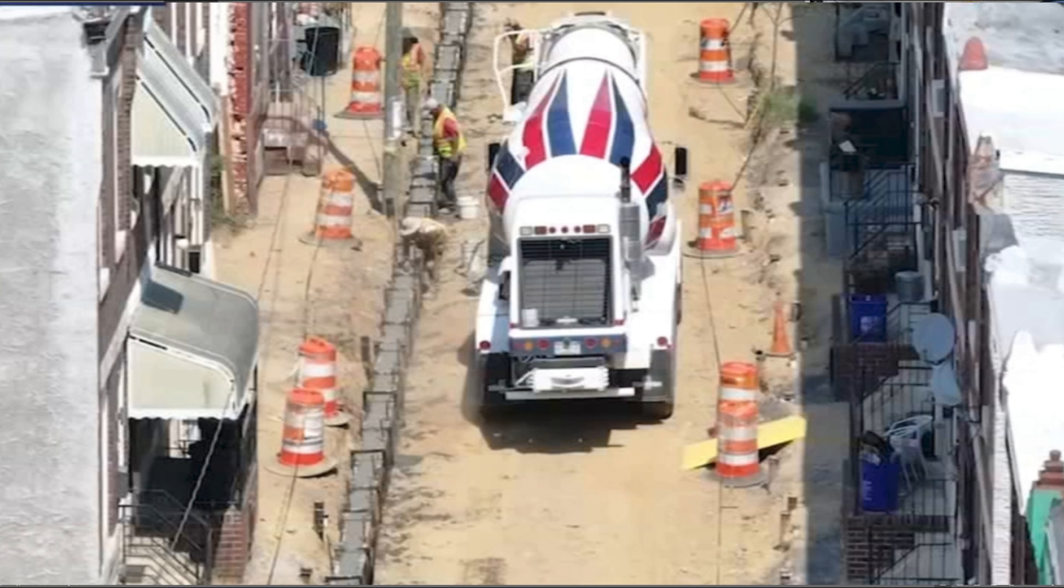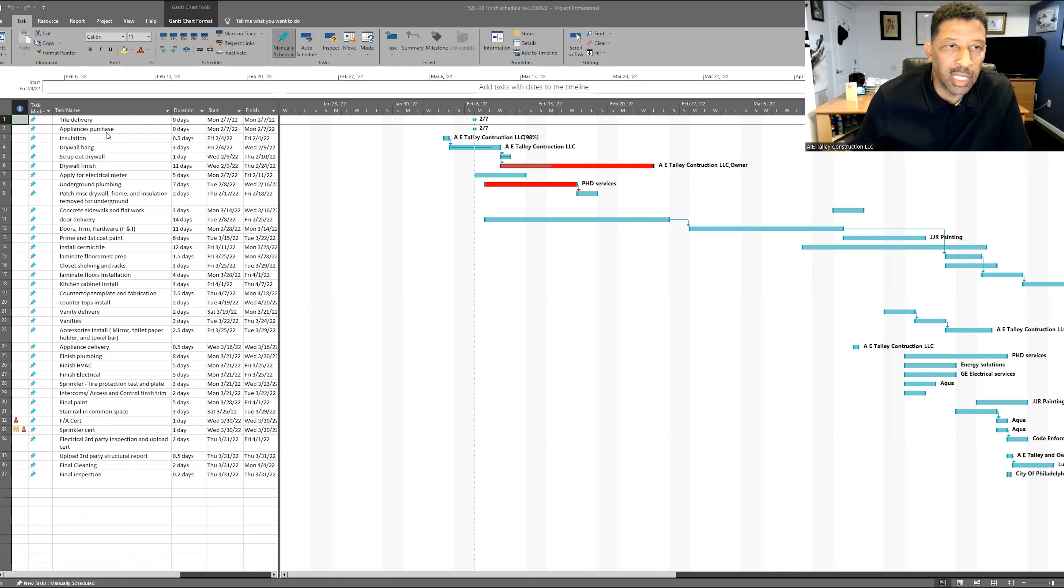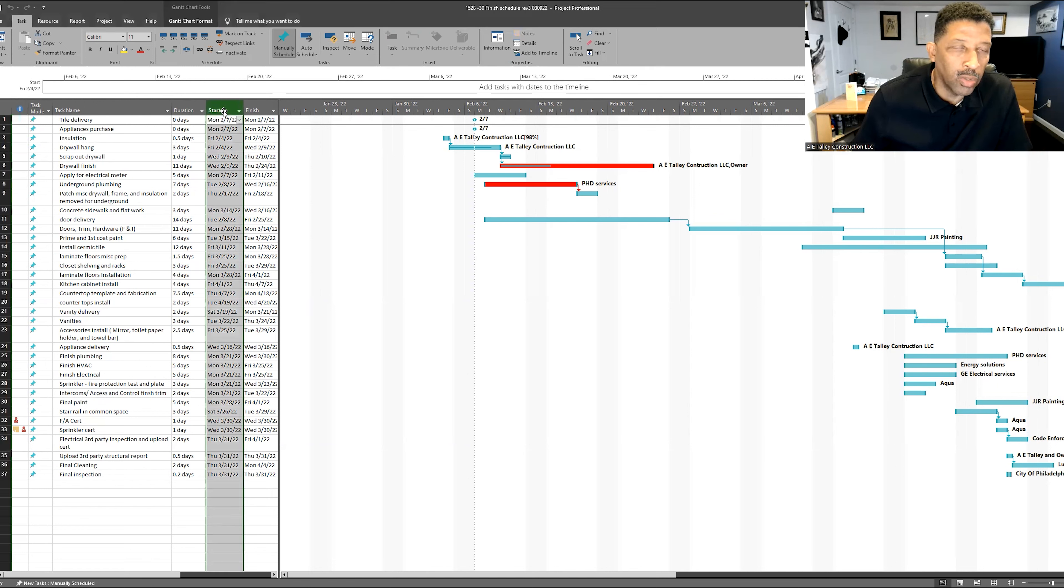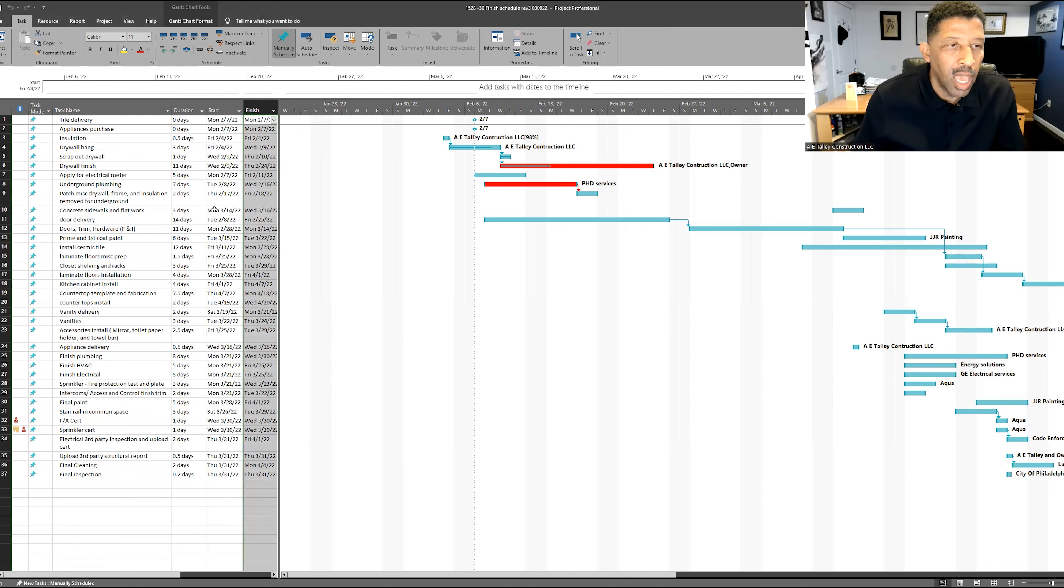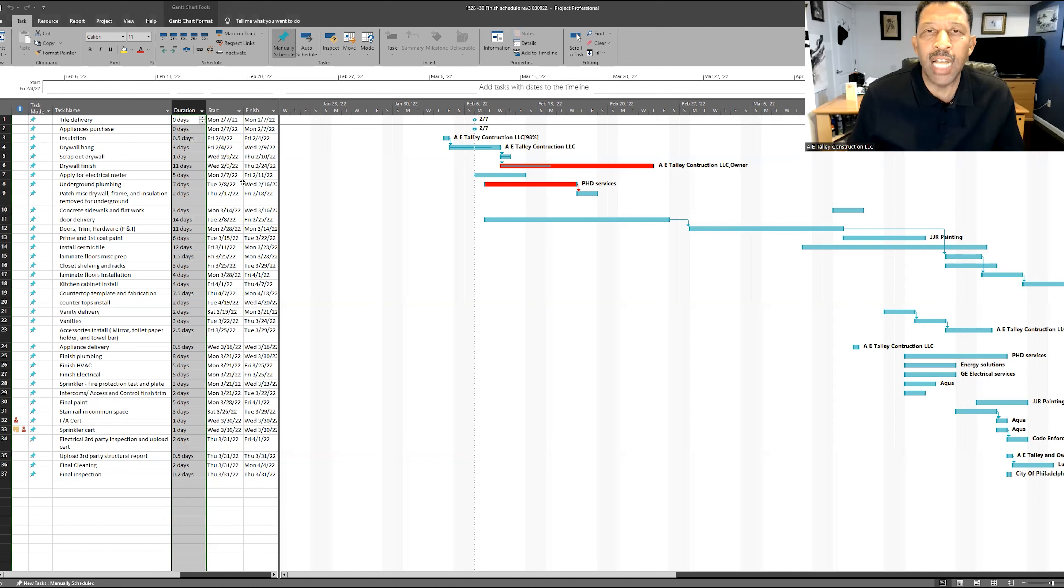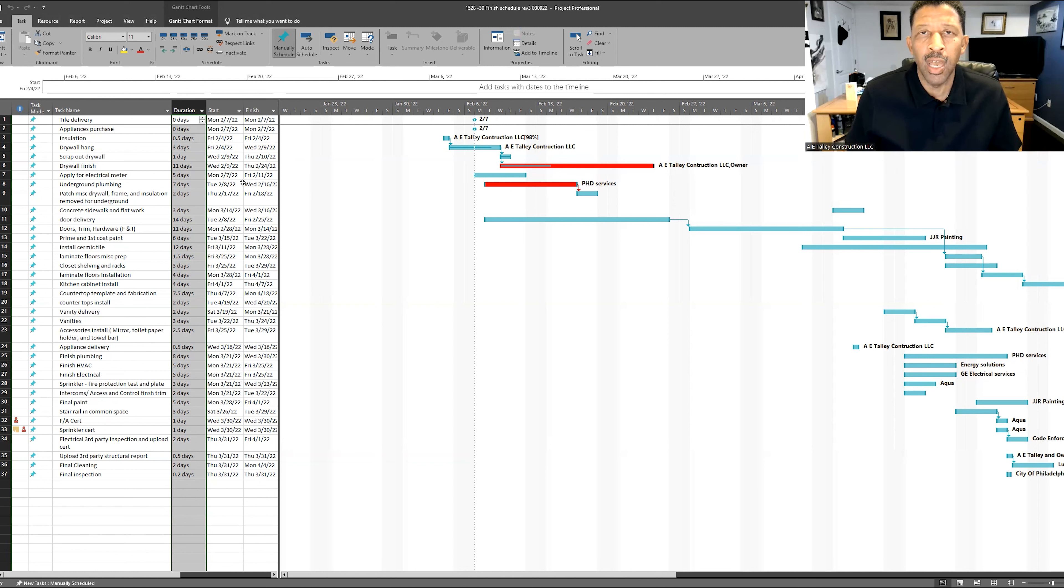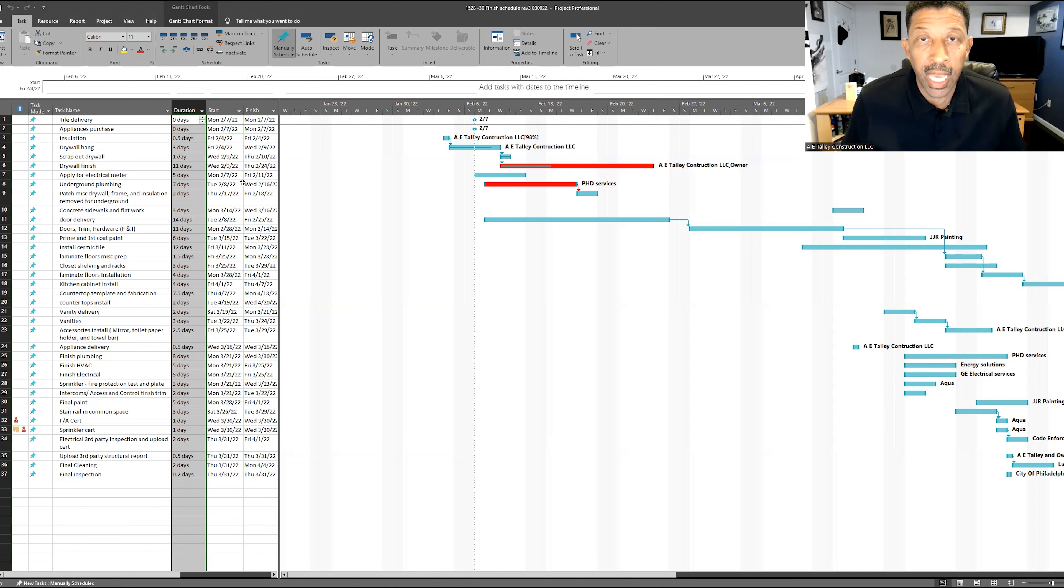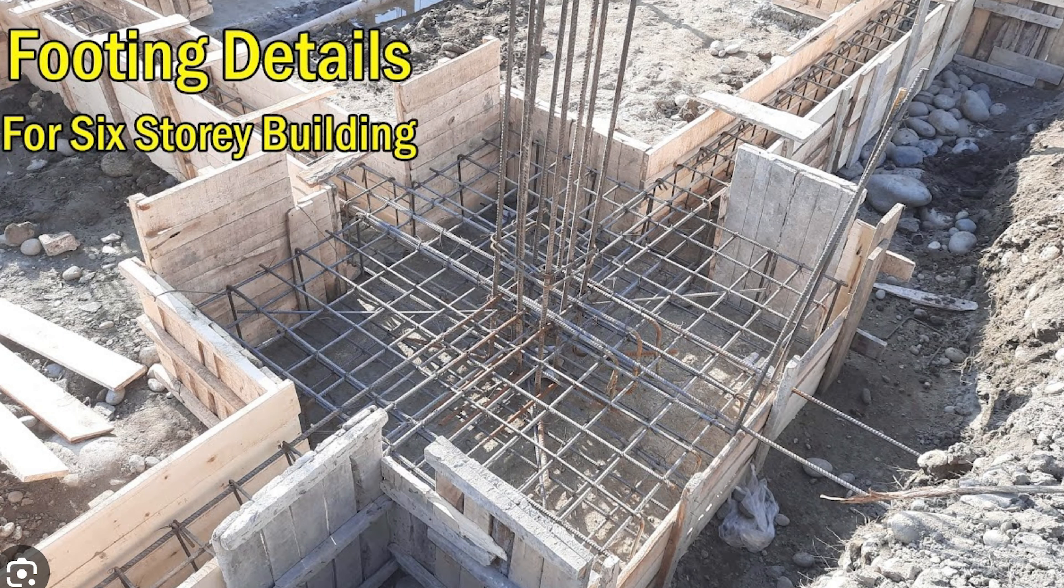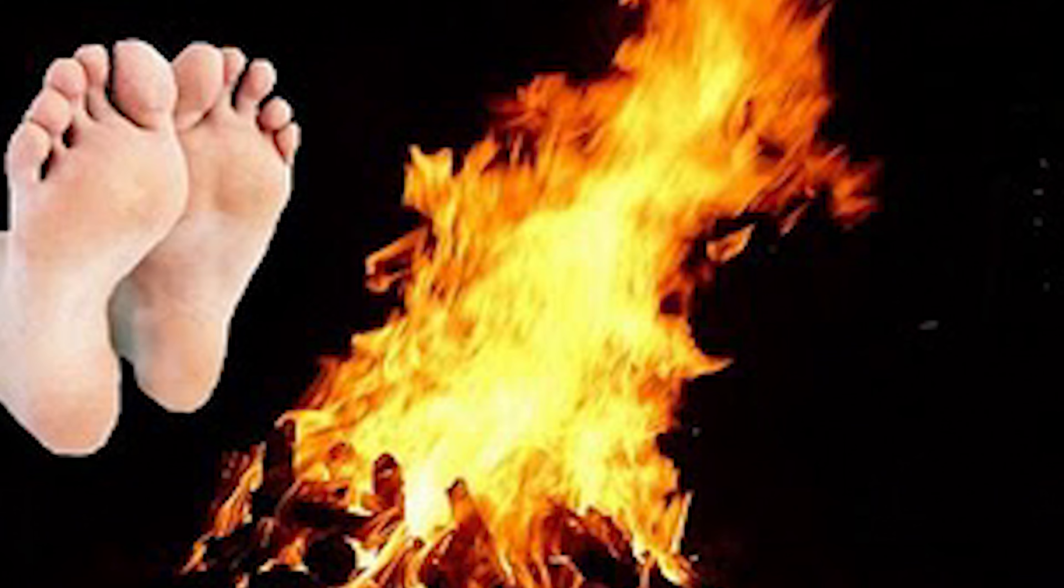So we'll take a moment and look at this project here. If you look at these line items here, we kind of break it down so that there's no guessing games. Everyone knows what they're doing the day they start. This is the start dates right here, and these are the finish dates right here, and this is your actual duration. Duration is the amount of time that it's going to take you to do it, and what we do is if we're using a subcontractor, we communicate specifically with them and say, yo, how long is it going to take you to pour the foundation on this project here? So if they give us some bogus number, we know what those numbers are. We have enough experience to know what those numbers are, but at least we're getting input from them so that we can't say, it's going to take you one day to pour a foundation on a six-story building. We know that's not possible, okay? So we get your input, we communicate with you, and we make sure we can hold your feet to the fire when it's not done.